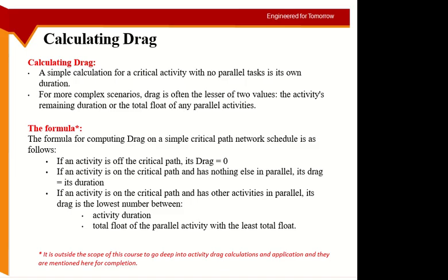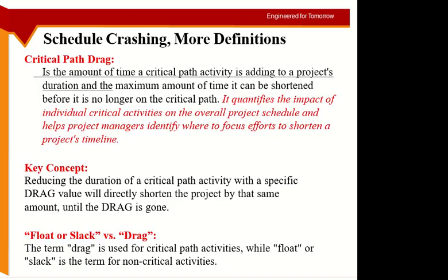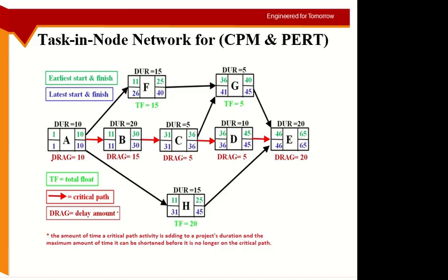So if there's nothing to compare, the drag becomes equal to duration. With activity A, there's nothing parallel, so drag equals duration. Same thing with E.